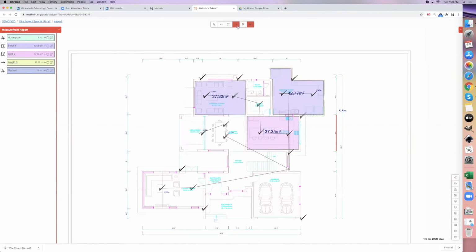And let's say you've got some electrical to do, you can start its runs as well, and run the same thing. You'd run them from the distributor board to wherever the plugs are on the buildings. For the drops here, with this software, you'd have to export to Excel, and for each run, allow for the distance from the roof or from the floor up, or vice versa.